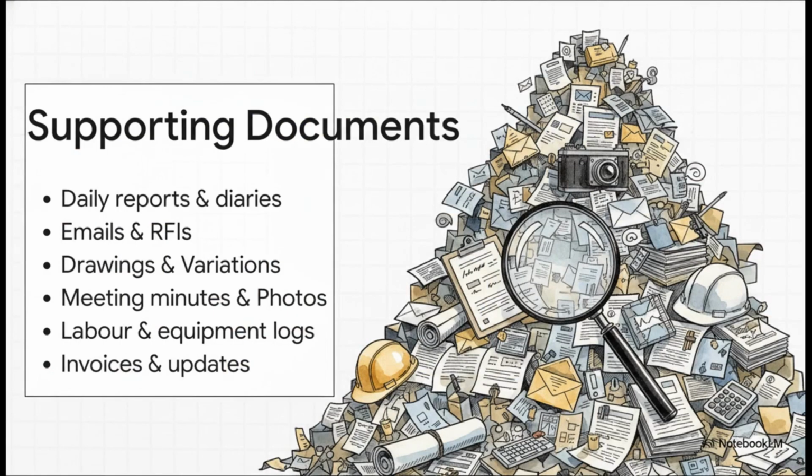Now, I want to circle back to Step 4 for a second, because I cannot emphasize enough how critical evidence is. Your entire case lives or dies on irrefutable documentation. We're talking daily reports, site diaries, emails, RFIs, variation instructions, meeting minutes, even labor records, equipment logs, and photos. Seriously, without this exact paper trail, your claim literally does not exist.